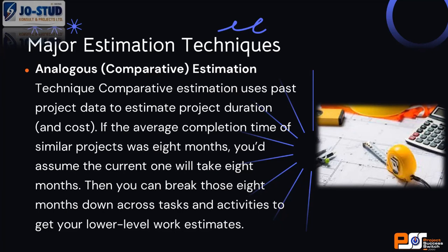Why? Or would cost the organization maybe 500 million. Why? Because you've done a similar thing to what they just described for 8 months, and it cost you 500 million. Now, let me come again. You have done a similar project to the one just described for 8 months, and it cost you 500 million.